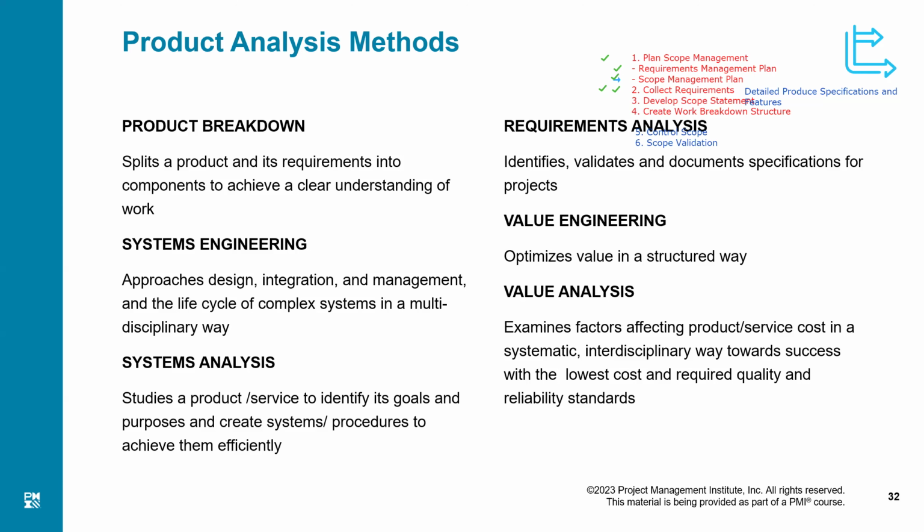Like in the UK, their standard, which is PRINCE2, only used to talk about the product breakdown structure, and they did not used to call it a project breakdown structure or a work breakdown structure. But for a couple of years now, they have joined hands and gotten into an agreement with PMI, and they are using quite similar terminology. They are also calling it a work breakdown structure.